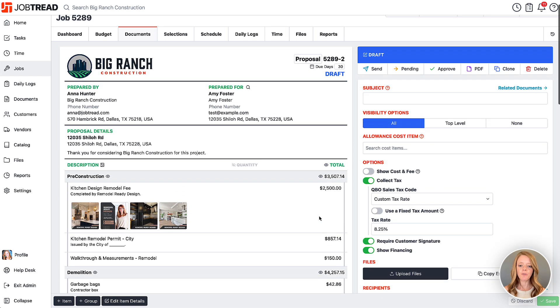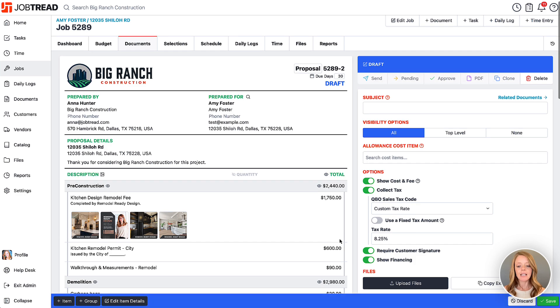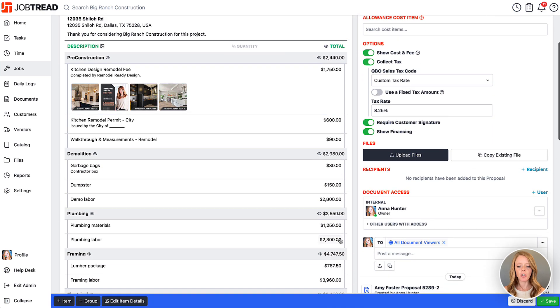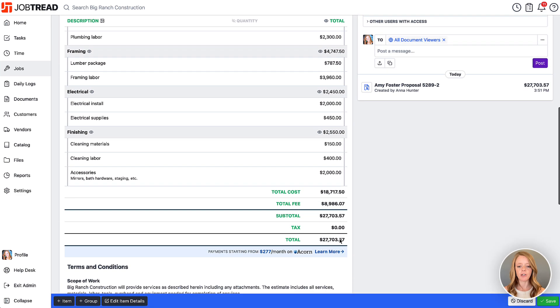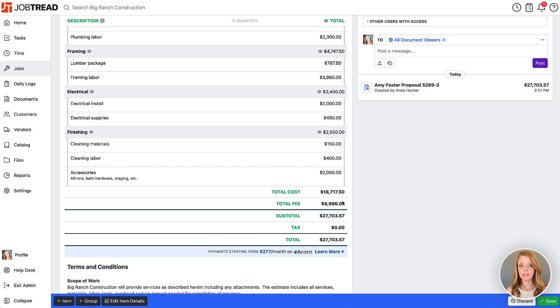Now if you're doing a cost plus job, you're going to want to turn on show cost and fee. This is going to show the cost of all of the project separate from your profits that you'll be walking away with. Therefore it's a bit more transparent to the customer, but that is specifically what cost plus means - the cost of the project plus your profits.